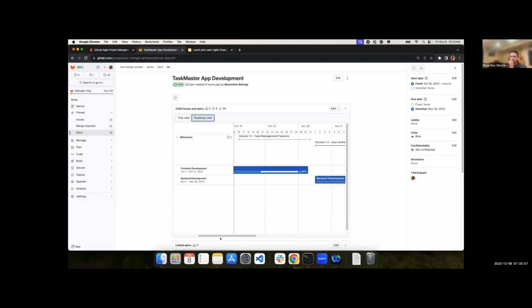You can make an issue and say this issue is blocked by this other issue, or this issue blocks this issue, so that it'll show up on the issue itself. I'm not sure where that would show in terms of the roadmap view. I think you can make epics also depend on each other, and it shows like a red something before the epic name on the roadmap view. But what would be nice is to see an arrow that goes from the epic that's blocking to the next one, just a visual.